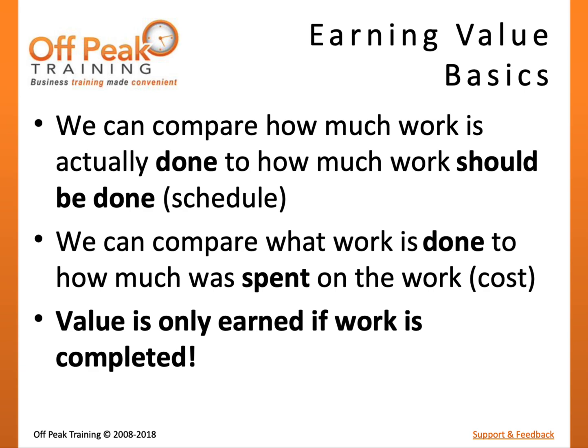Here are the basics. We can compare how much work is actually done to how much work should be done to reveal schedule performance. We can also compare what work is done to how much money was spent on the work to reveal cost performance. Value is only earned if the work is completed.